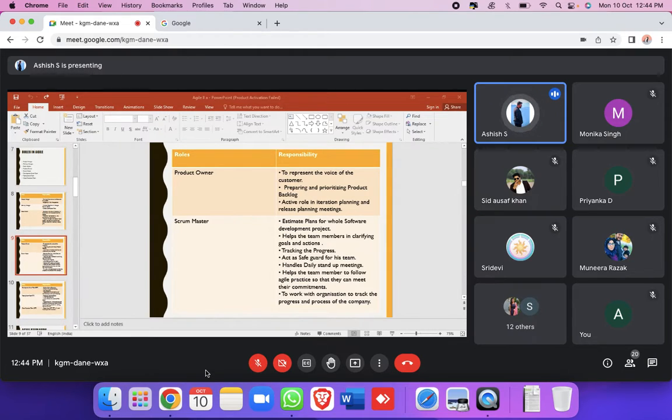If he is very busy and not able to take care of how the process is going inside the company, what will happen? In our own company, we will choose one person to act as a product owner. He won't be involved in testing or development activities of that application. He'll just be monitoring the work, how it has to go, and prioritizing the product backlog. So it depends upon the particular application, how it is going on.